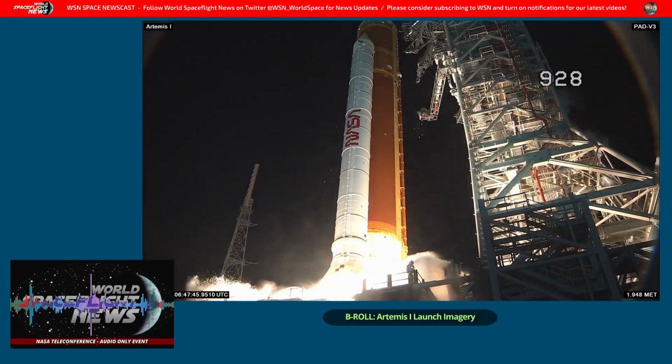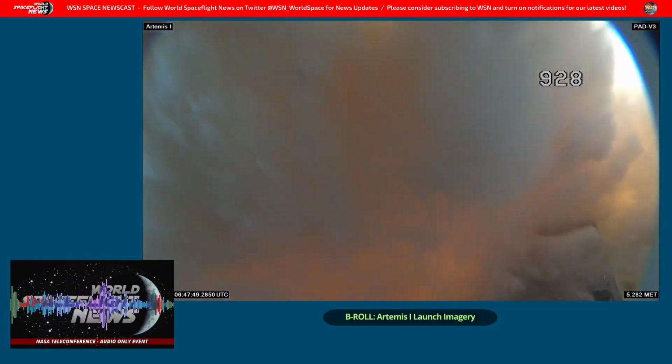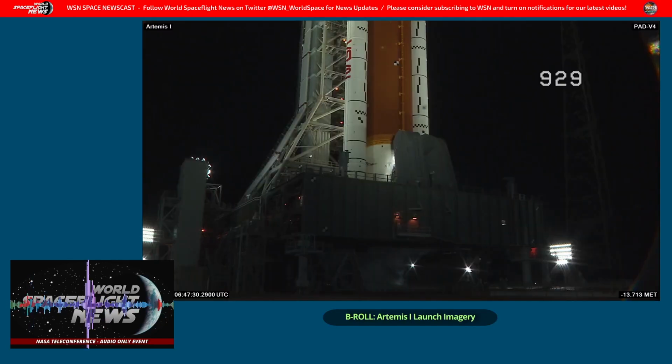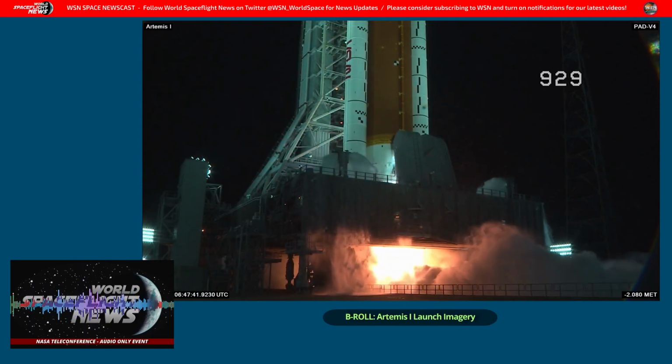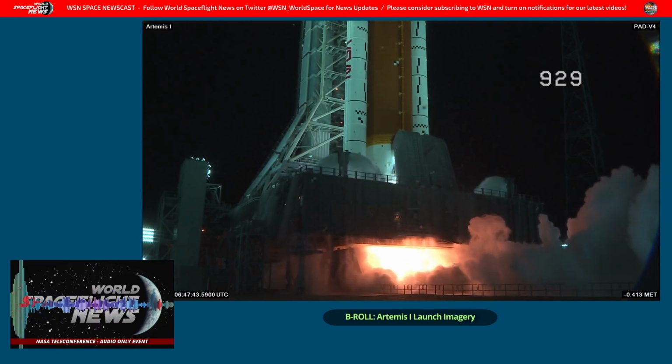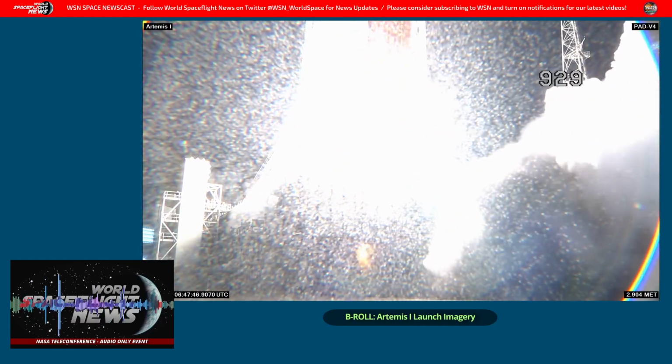And then on the RS-25 area, we ended the shuttle program. The SLS program had assets from the program of record in 16 RS-25 engines that were repurposed for SLS. Obviously we had the need to start the production line up again. So we did what was called a production restart activity, and we have begun a series of, I believe it's 11 or 12 acceptance tests. We've done 2 of those, and as I mentioned in my opening remarks, we'll be doing the 3rd acceptance test this week. And so, our affordability initiatives on RS-25 have worked out really well, and I don't see any issues with the team getting through the acceptance program the way we have it laid out today.